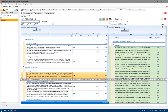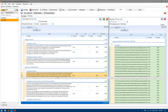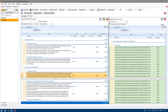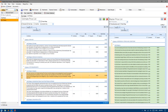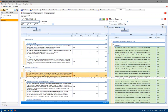Now, this item here — the site costs do not include peering. This one's a very important note. Some builders provide an allowance in their base price for peering, or go above and beyond to anticipate that peering may be required if they've got further knowledge around cut-and-fill platforms. I've got absolutely no elevations, no site — this is just a house in theory. Our pricing has made no allowance for peering whatsoever.